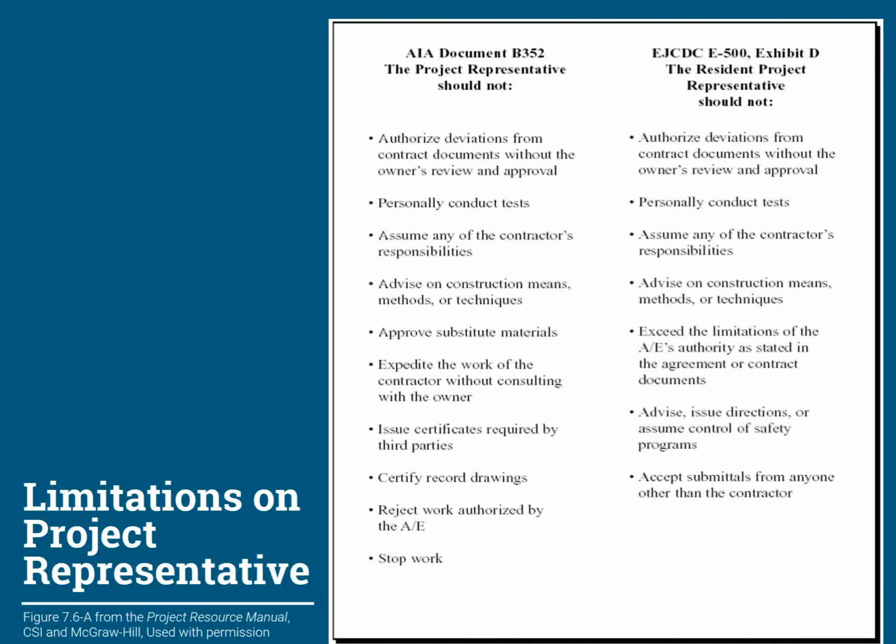Often substitutions come after the bid. And in my experience, it's an opportunity then to have a discussion with your client about whether or not that is an acceptable substitution, if it is actually an equal product or not. But you have to be careful because it can lead to complications with the bid itself if it's a major substitution and others didn't have an opportunity to bid it. So that's why I say it depends.